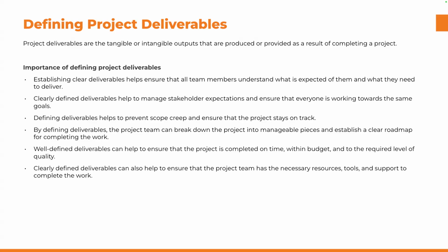To mitigate such a dependency, you could say, okay, you know what, let's order it ahead of time. And even if it means it goes live before we're ready, it's better we pay that additional cost than the cost of having to work backwards to hurry and then get it in. Do you understand?